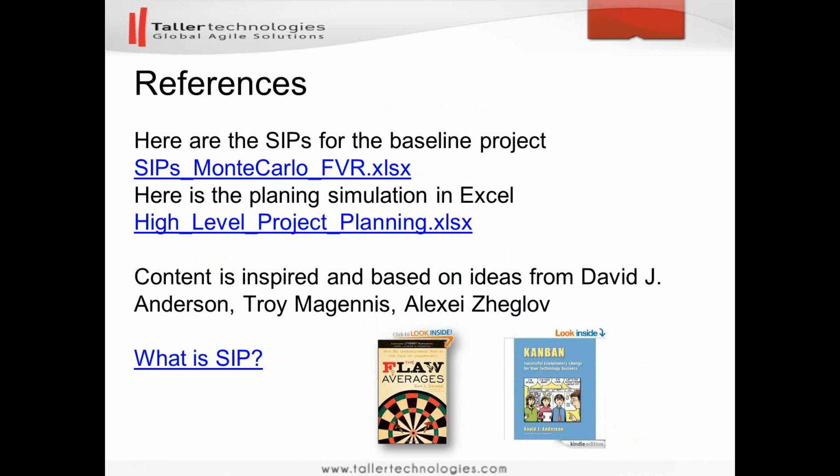We put them in a hat, and we pick a value at random out of the hat. That is, we randomly pick one of the instances that have happened to us. That's the nature and meaning, a simple explanation, of the resampling technique. But again, please read the book. It will be worth it, definitely, for everybody.